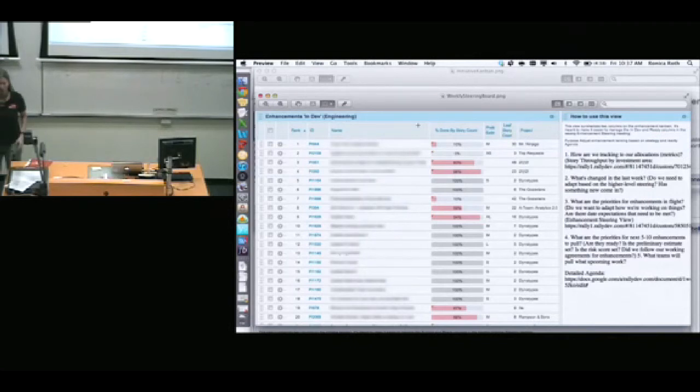There was a time where our customer base was growing really fast, our users were growing really fast, and our architecture was not going to make it, and development was grinding to a halt, and we had the data to show it. Things weren't getting done. And so engineering was able to make a value case for delivering zero features for one quarter while they worked on infrastructure and architecture and performance and scalability.